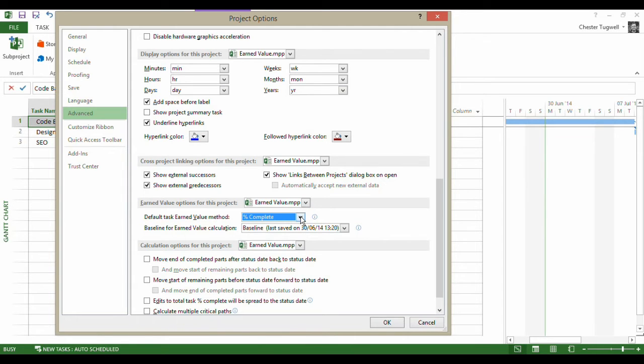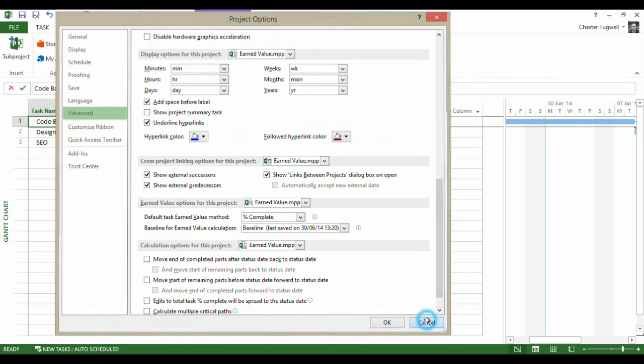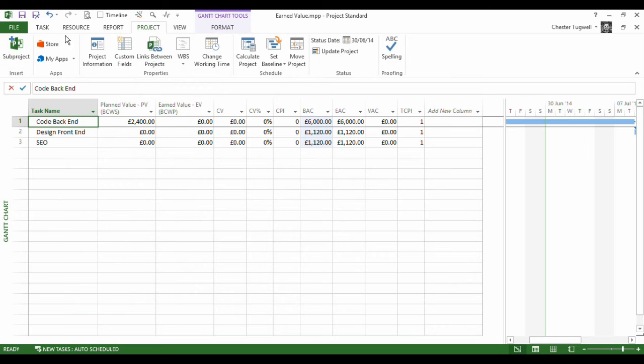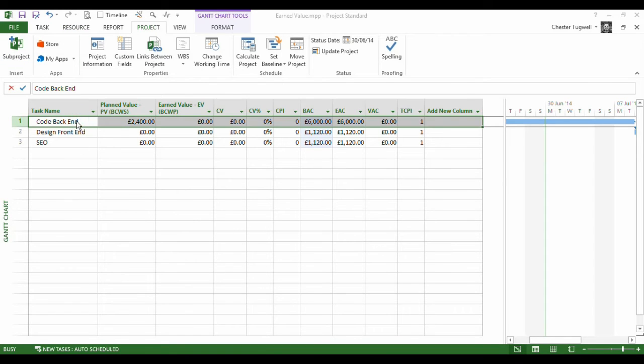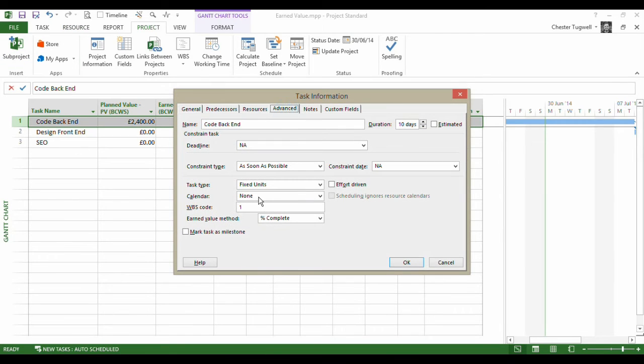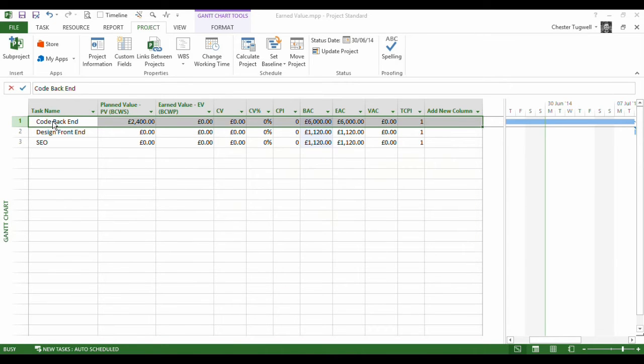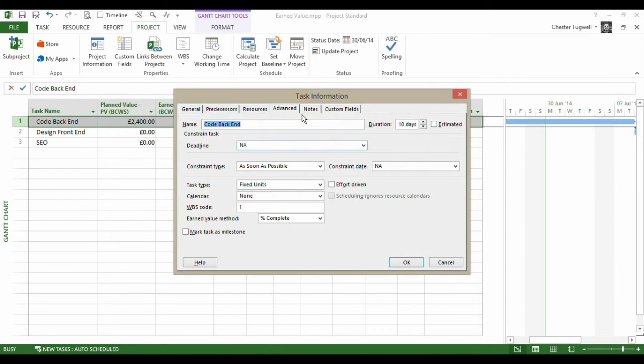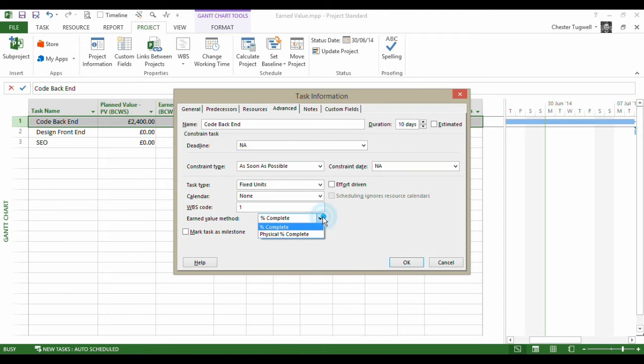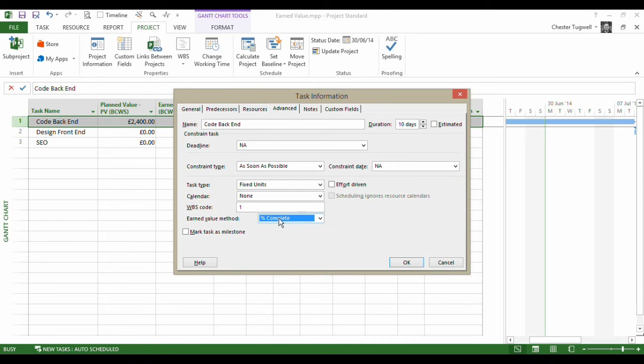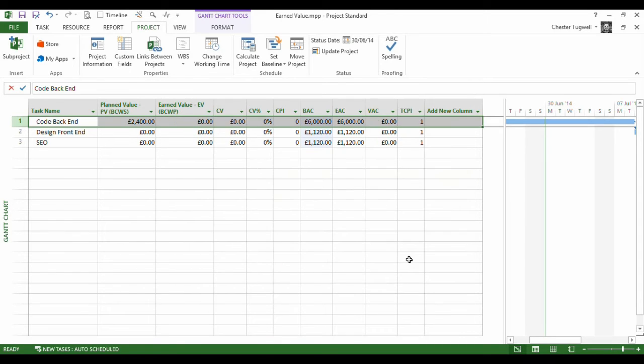Now there is a physical percent complete column that you can use when you track progress on your project. I'll just show you though that that default basically does is when you create a new task, it sets - I'm in the task information screen for a task - it just by default sets this earned value method here. So you can do it on a task by task basis as well, but we're just for simplicity's sake keeping it at percent complete, which is probably the method that you'll most often use.